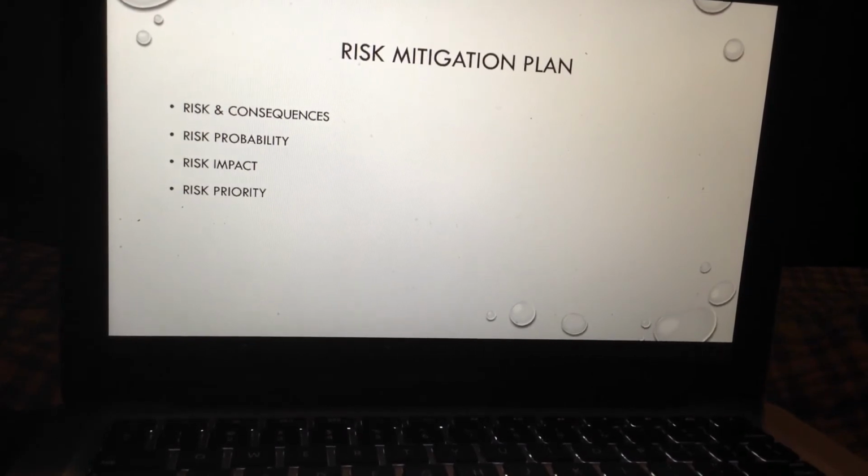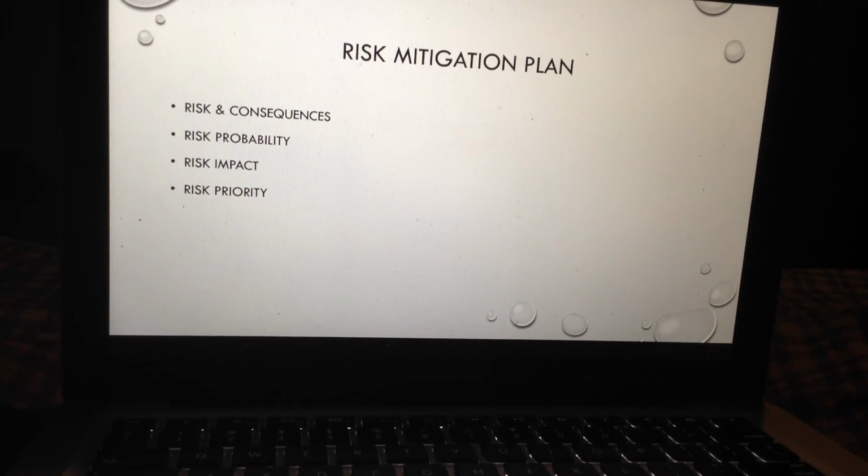Probability is that there's a high probability rate due to exposure and risk of patient health information if it's so easily accessible to non-authorized users but not accessible to the healthcare provider. According to the scale I used, I found that the probability is very likely. There's a high likelihood of it occurring. The impact, I found, is that if there are proper interventions and implementation to help increase the security and create easier options for the physician to access information, there'll be a positive outcome.